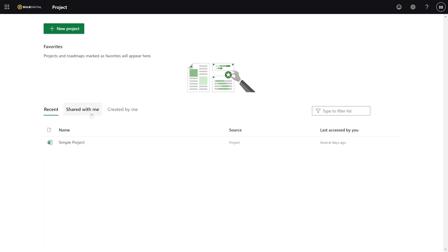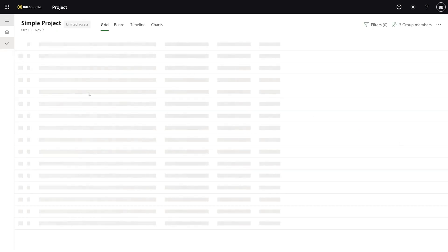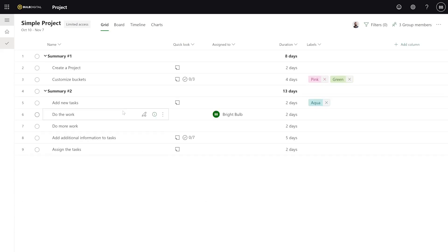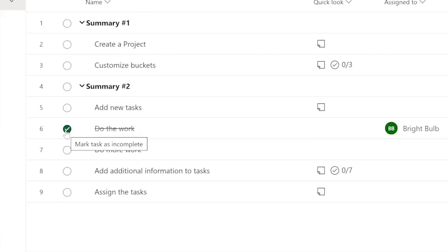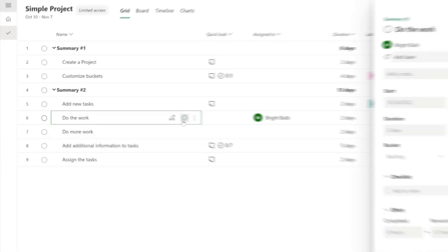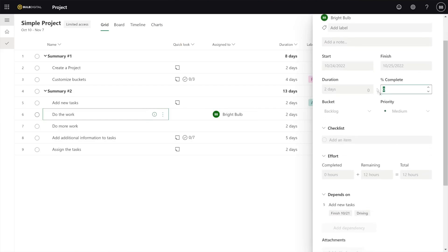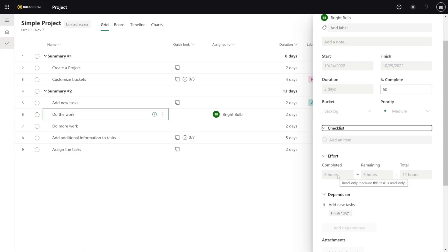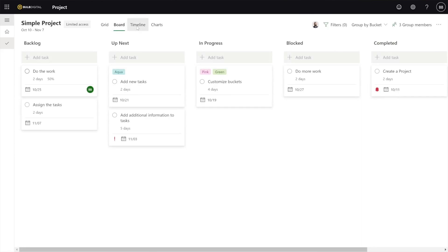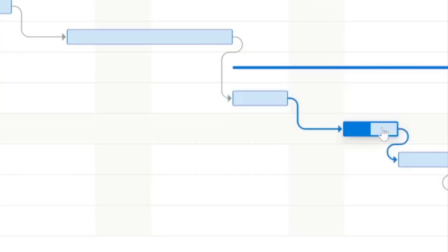Down below, you'll see Recent, Shared With Me, Created By Me. If they click Shared With Me, you're going to see two projects — one is the recent one I was playing around with before, and the top one is the new one I just created. As you can see, they can come in and now see the tasks they're working on. By doing the checkbox at the end, they can say 'I finished this task' — super simple. They can also view the details of the task and enter a percentage complete. Maybe they're 50% done — that's going to update the completed and remaining hours and show in the board view or timeline view how much this user has completed of their task.